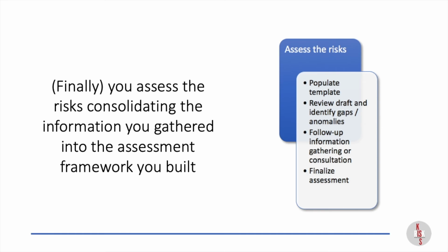So you're going to take all of the information you've consolidated and populate the framework that you built in order to complete the assessment. And that framework and that template could be a Word document, it could be a spreadsheet, it could be a piece of software. Whatever is most appropriate for your organization, whatever fits for you, and whichever matches any guidelines and standards you have in place. That's the template you're going to use. So all of the information from the understanding stage is now going to be added to that template.